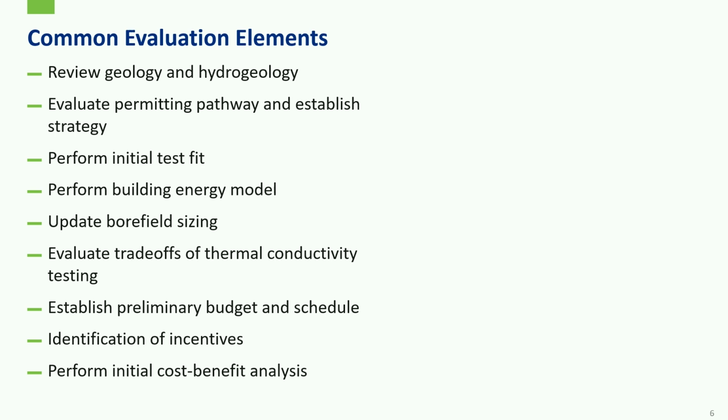So at that point, you really need to look at the drill or not to drill question. Some clients want to do this right up front. Let's get it out of the way, I've got budget for it. Others look at it as, gosh, do I really have to spend between $50,000 and $100,000, or maybe a little less depending on the circumstances? In any case, it becomes a sizable amount of capital in a feasibility phase where you're just validating the concept.